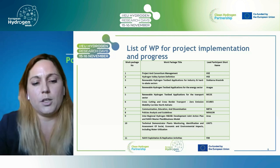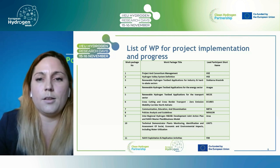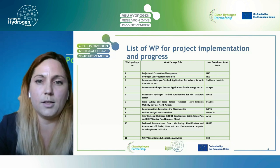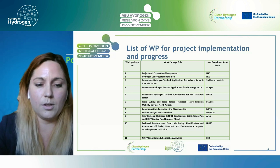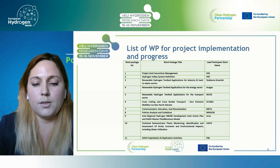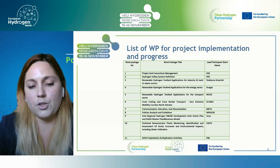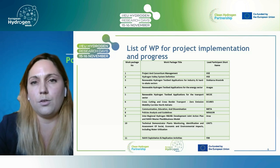The whole duration of the project is 6 years. In the first 2 years, we expect to complete all necessary documentation, secure all the funds needed for the project, obtain all required permits, and specify all characteristics of the project. In the second 2 years, we will focus on the procurement of all necessary equipment, construction, and commissioning of the pilot equipment. This will be followed by 2 years of operation and demonstration of the targeted production and distribution quantities of renewable hydrogen.